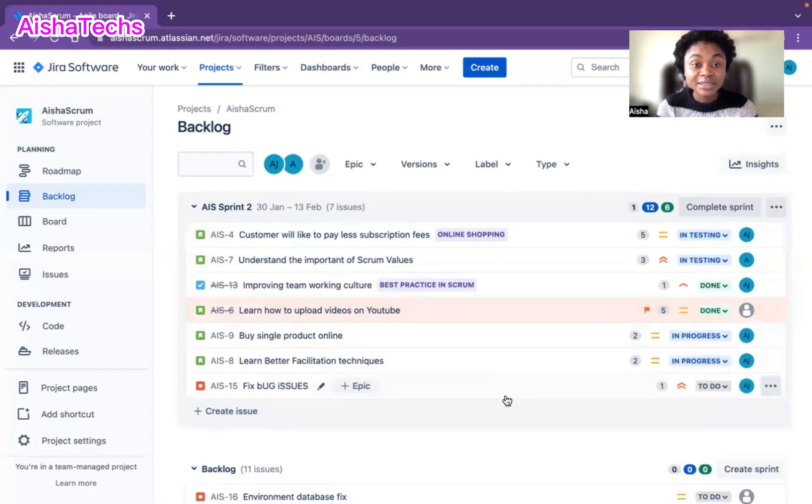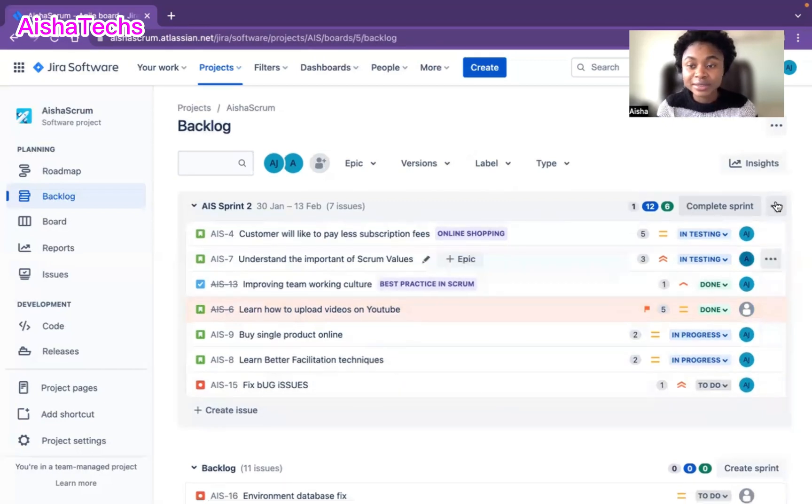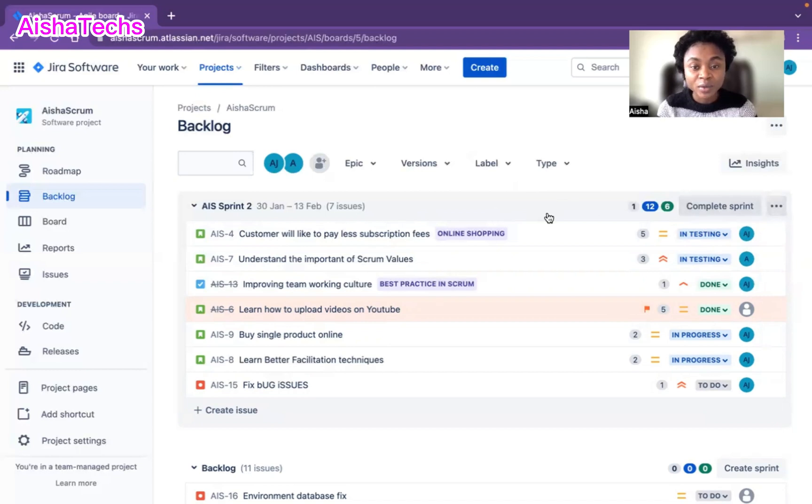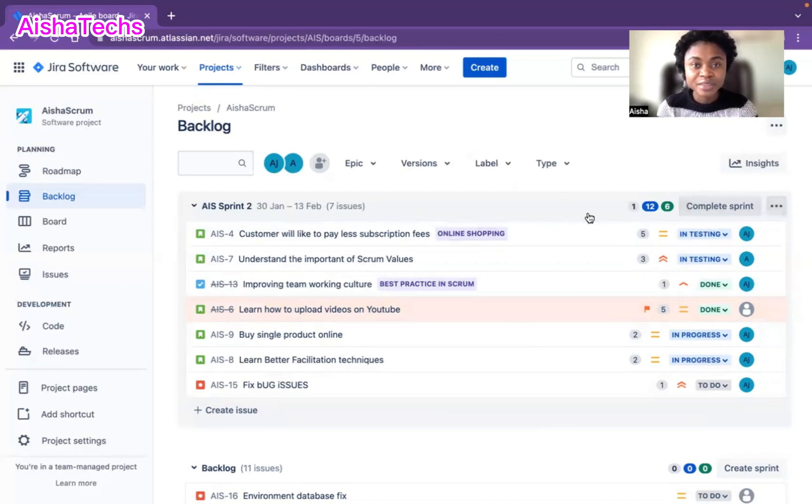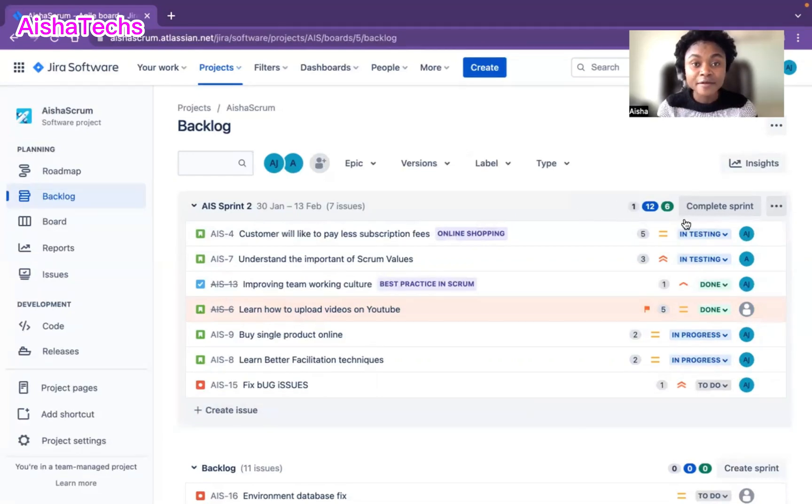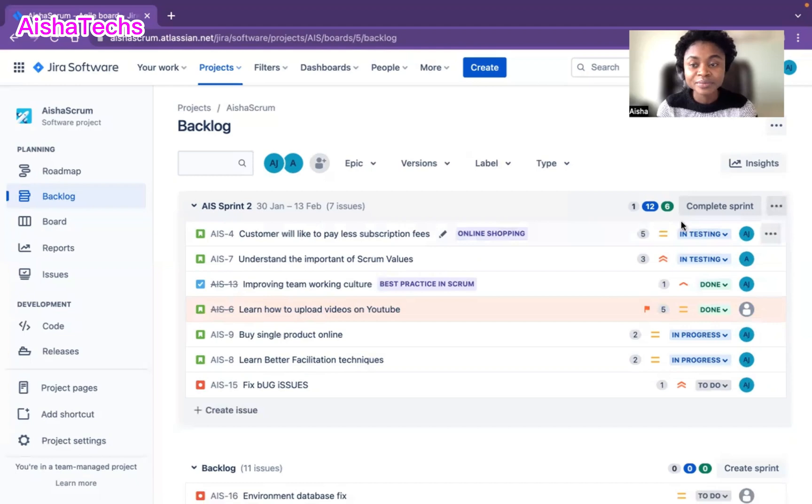To add the sprint score, you just come to the three dots next to your sprint and click on those three dots. Remember, you have to have the privilege to start or close a sprint to be able to edit a sprint.